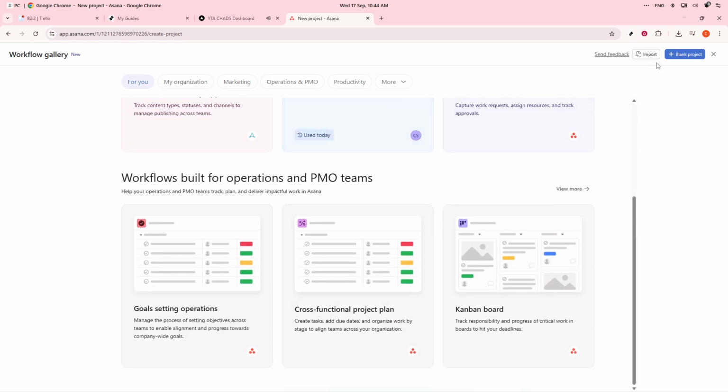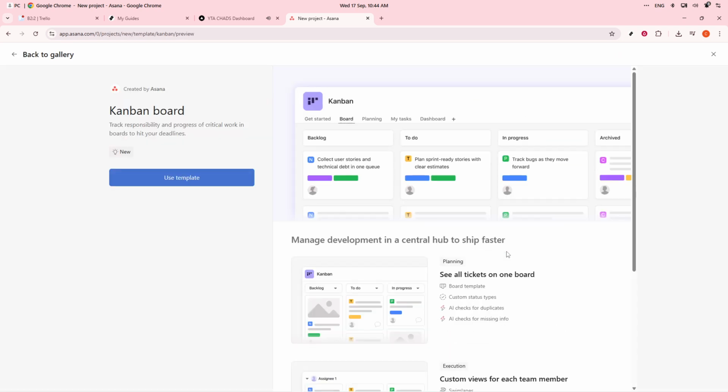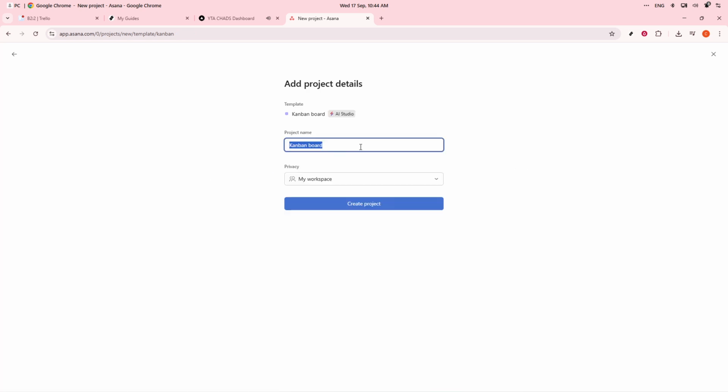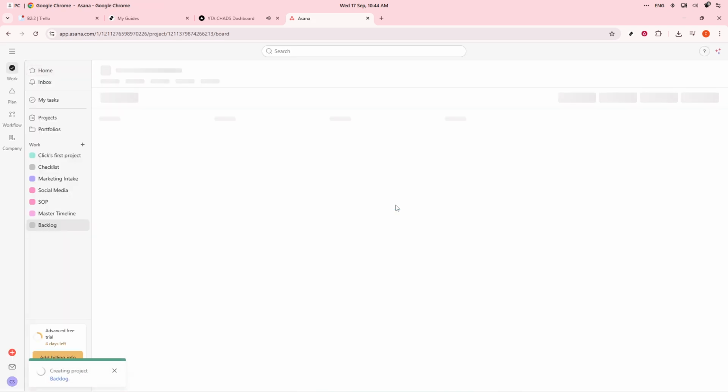Once that's done, you'll need to decide on your layout. If you prefer a prioritization list, choose List View, but if you're more familiar with the Kanban style, Board View would be ideal. Now, this is essential. Add sections or columns to organize your tasks effectively. I recommend sections like New Ideas, Ready for Review, Approved for Sprint, and Icebox for those lower priority items. Think of this as your central hub for all things backlog.